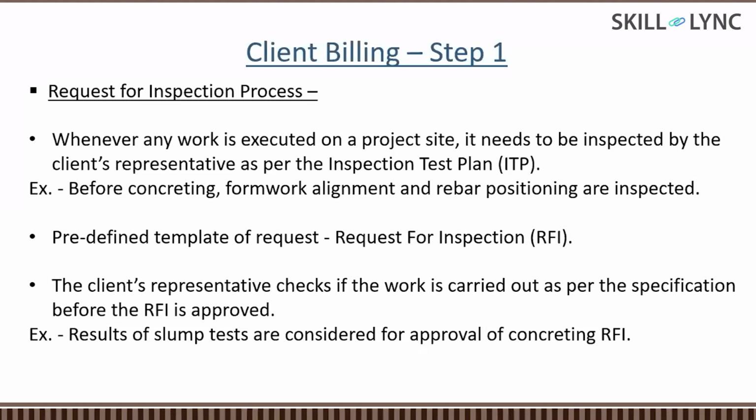if any project is happening, let's say tomorrow you have to do the concreting work. The site engineer and quality engineer have to do the concreting work for the columns, let's suppose 10 columns. But before that, everything has to be inspected by the client's representative. He may be a junior engineer, or an engineer from the consultancy deployed by the client. So the site engineer or quality engineer will raise a request for inspection to the client.